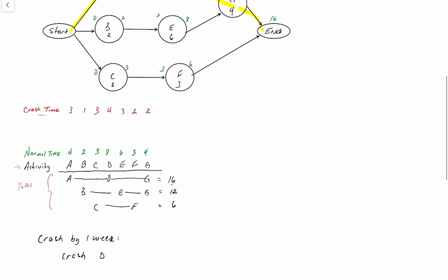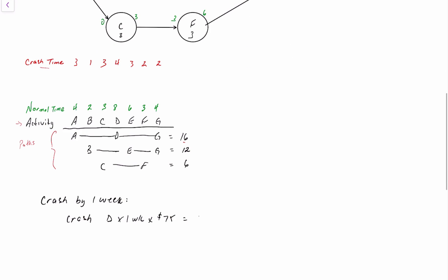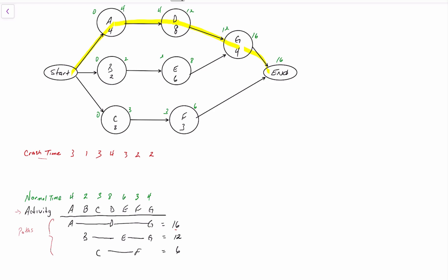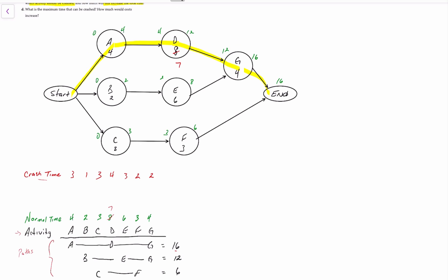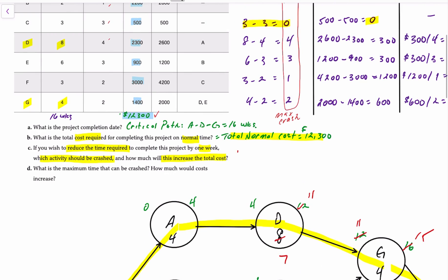We crash activity D by one week at a cost of $75, for a total cost increase of $75. With D reduced by one week, it now takes seven weeks to complete. Four plus seven is 11 weeks to the earliest start of G. Eleven plus four is 15, so the project now ends in 15 weeks. That answers part C: crash activity D for a total additional cost of $75.